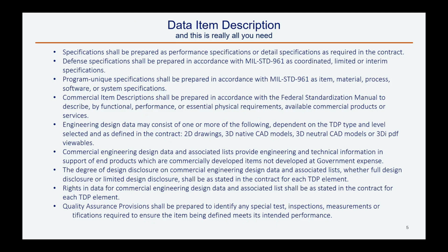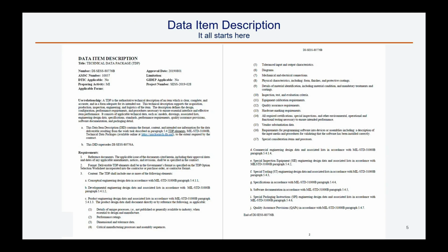These excerpts from MIL Standard 31000 set the boundaries for the technical data that will be delivered. It all begins with the selection of the data item description. Because the CDRL and ultimately the Statement of Work cannot extend data requirements, it is critical that the appropriate DID be selected that will not unduly restrict the delivery of the data necessary to support the needs of the program.